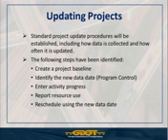Okay, so the next thing we're going to talk about is updating projects. We'd always recommend, and what you guys have right now already is a standard project updating process. And when we say standard, it basically means that everyone is updating their schedules at a certain point in time. Like, I think you guys do it now every other week. And then as far as establishing a Primavera process for updating the schedules, the steps that are typically included are developing the schedule, creating a project baseline, identifying what we call the data date, which I'm going to talk about a little bit more.